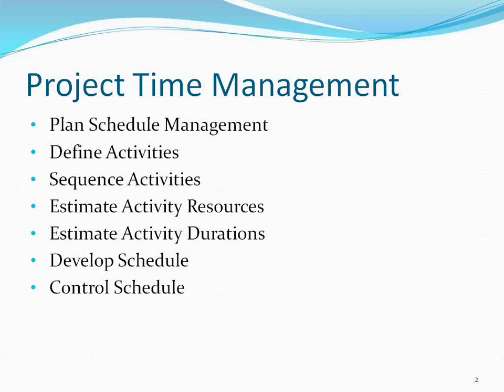The same activity may take less time if you have 20 people, when the resources are more. So, depending upon the resources, your duration will change. If you have 30 people, duration will be different. If you have 2 people, duration will be different. So, first you find out how many resources and what type of resources you have, and then estimate activity duration.